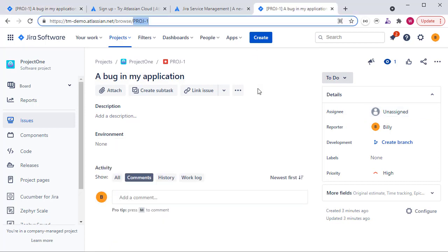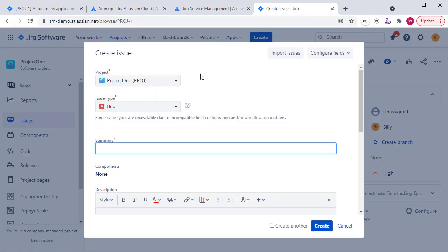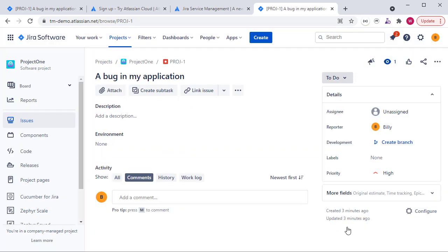And that's it on the basics. Once you've set up your own instance of Jira or found an instance of Jira that you can practice on, there's nothing too difficult when it comes to creating an issue. Click on the Create button, make sure you select the right project, the issue type, and enter some details about the unit of work you want to track using this issue. In the next module, we'll look in a little more detail at how we can organize our issues by grouping them into different projects and categorizing them using some of the metadata that we've looked at in this video today.